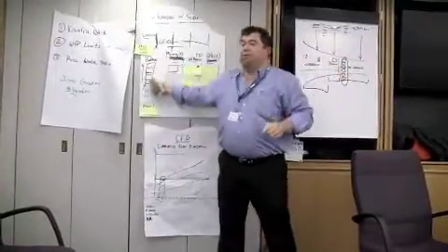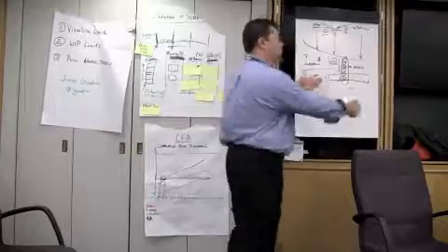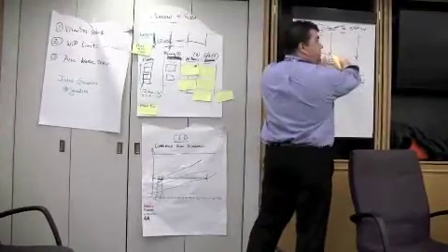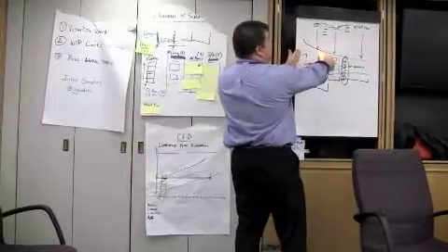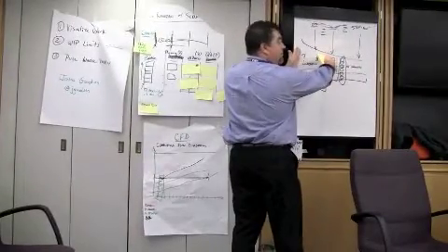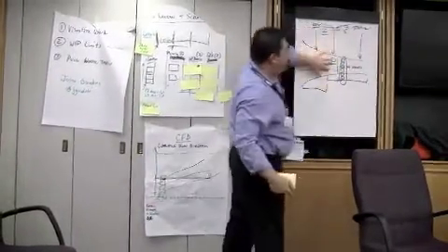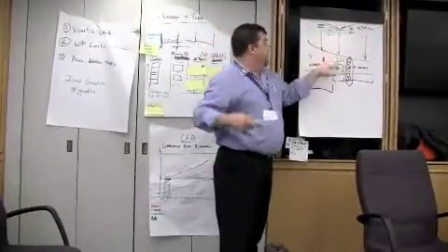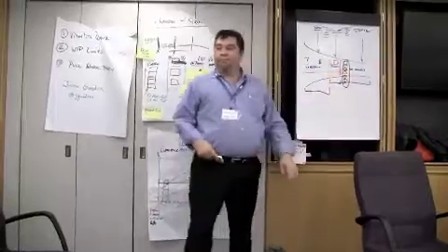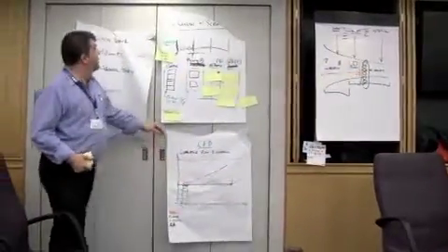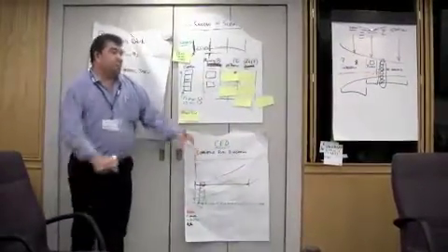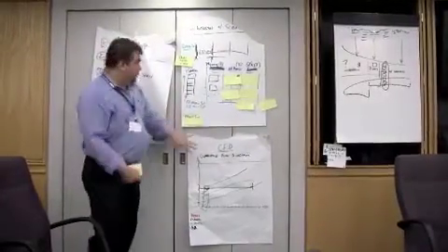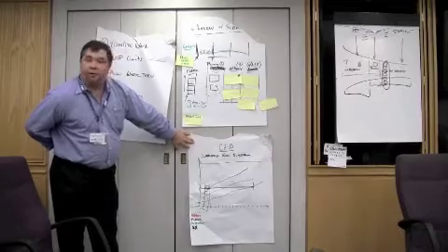Eventually, the stories show up on my backlog, right? So we'll use Kanban boards at these stages too, so that I'm not planning too much, or I'm not doing too much business case on any particular feature at a time. So the cards on these boards are not user story cards, they're higher level feature cards that break down into user stories later. And then finally, rather than using burn down charts, because we don't have iterations anymore, we just have flow happening, we use a diagram called a cumulative flow diagram.